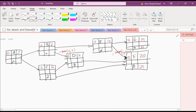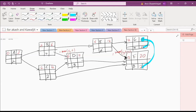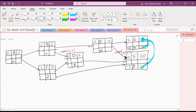Notice that this activity also has a latest finish time of twenty-one. This is a special situation. Both activities G and F are leaf activities — the last activities of the project. Now we go through the reverse direction. Twenty-one minus nine is twelve. Twenty-one minus eight would be thirteen. This would be the minimum of twelve and thirteen.